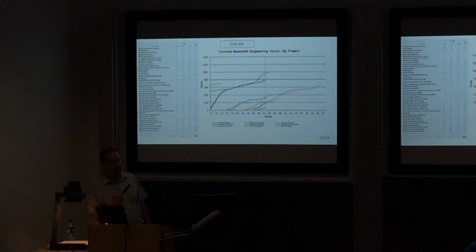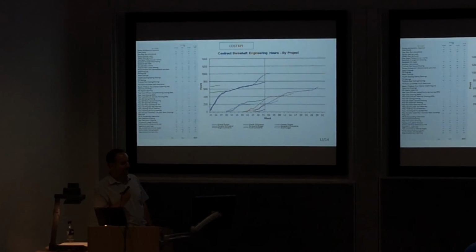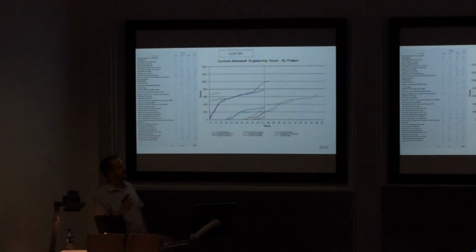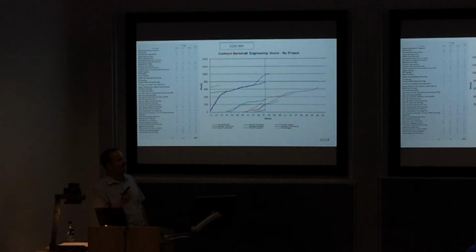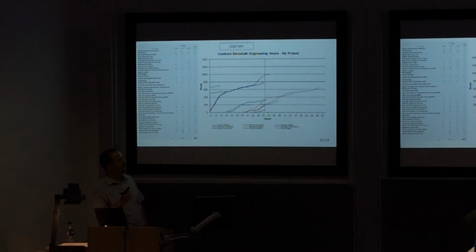On this graph, it's a little bit confusing, but there are different colours to represent the projects that we were making at the time. At the snapshot, which was Christmas 2011 probably, we had 4 or 5 projects on the go. This one shown in blue was the closest to being completed. We projected there was going to be a lot of hours taken in at the end of the project as it went into testing. As it happened, we didn't test that until the following year, so it would have continued up.